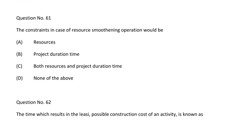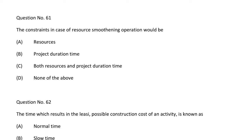Next question: the constraint in case of resource smoothening operation would be — option A resource, option B project duration time, option C both resource and project duration time, option D none of the above. The correct answer is option B, project duration time.